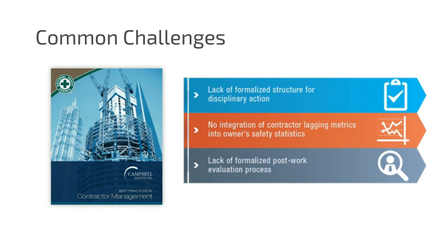What's the formal structure? And companies are reluctant to terminate contracts for jobs that are halfway done, and there's very good reasons for that, of course. There's legal issues, there's cost issues, but it also introduces significant risk to your organization, and risk in terms of the job, not just for people getting hurt. There's cost risk and completion risk, safety risk.